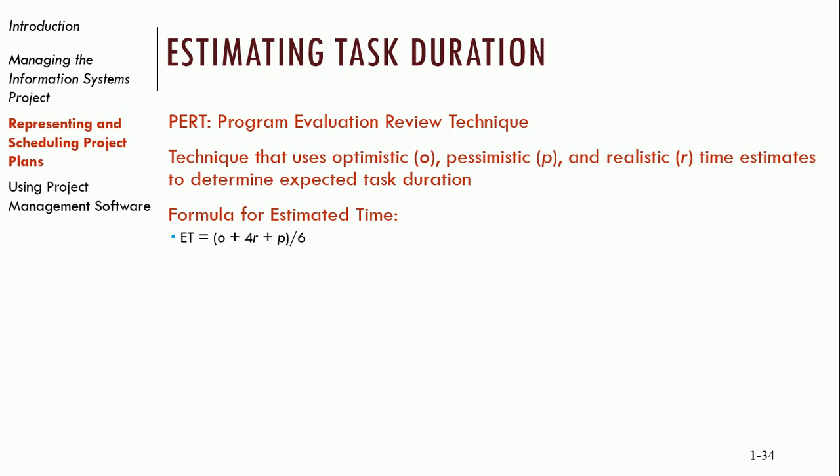We use a little formula: estimated time = (optimistic + 4 × realistic + pessimistic) ÷ 6. That gives us a weighted average, and as you can see, the average is weighted heavily towards the realistic estimate.